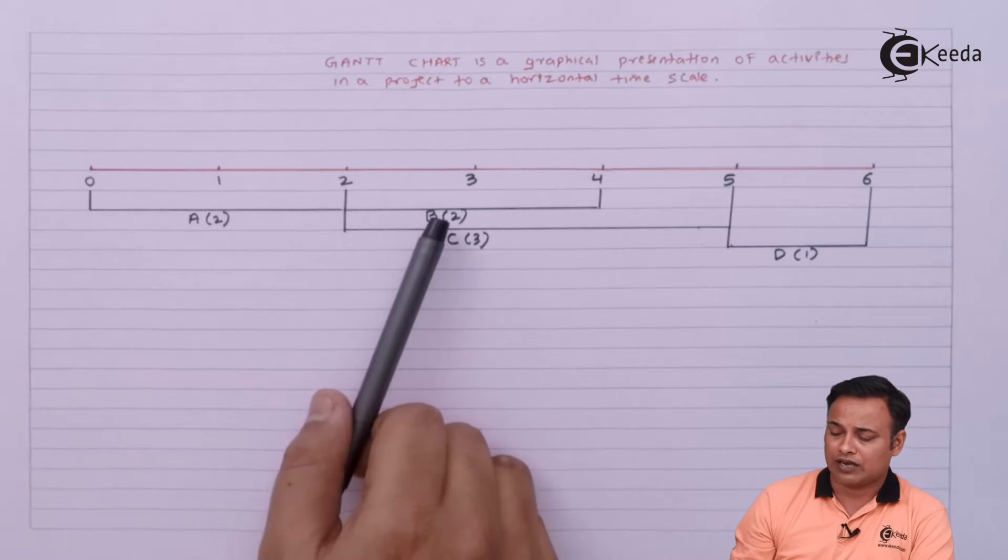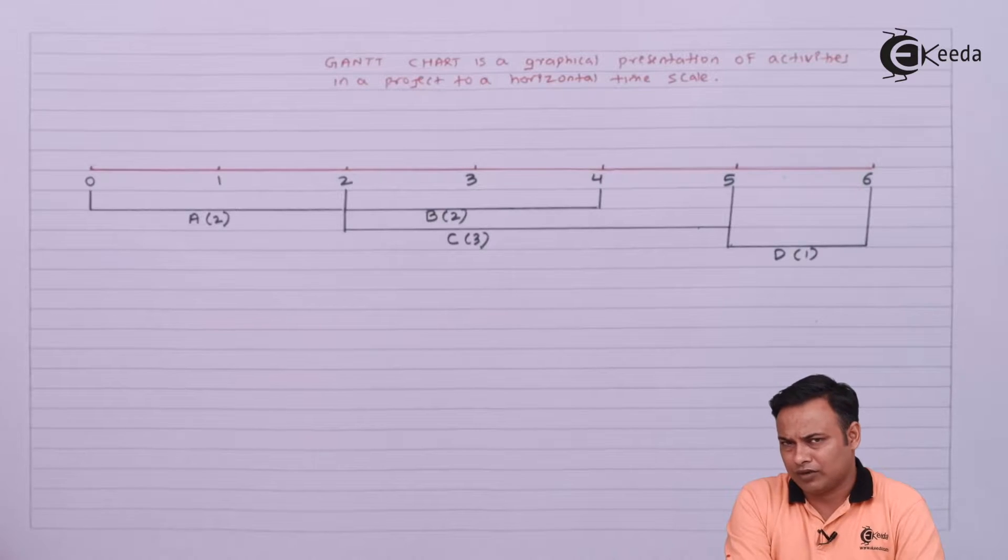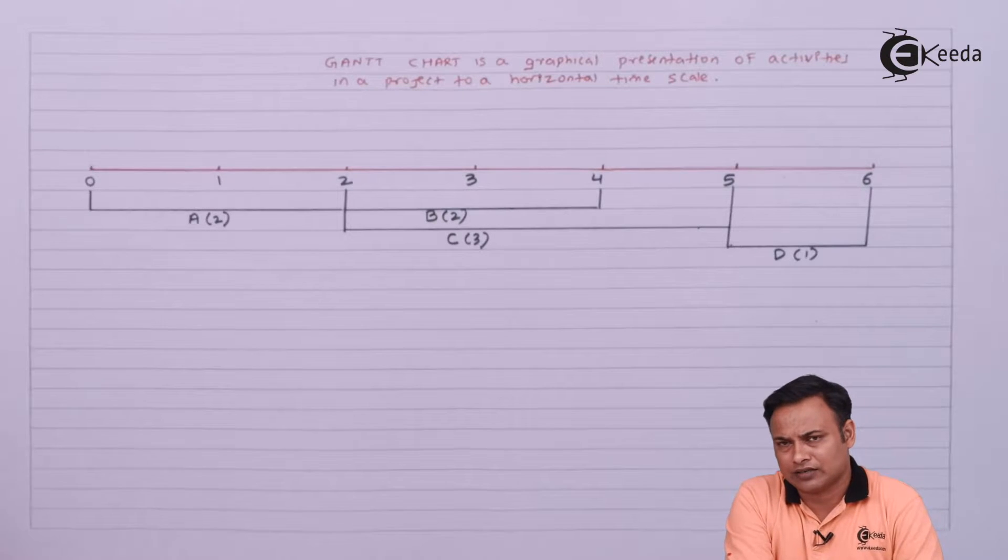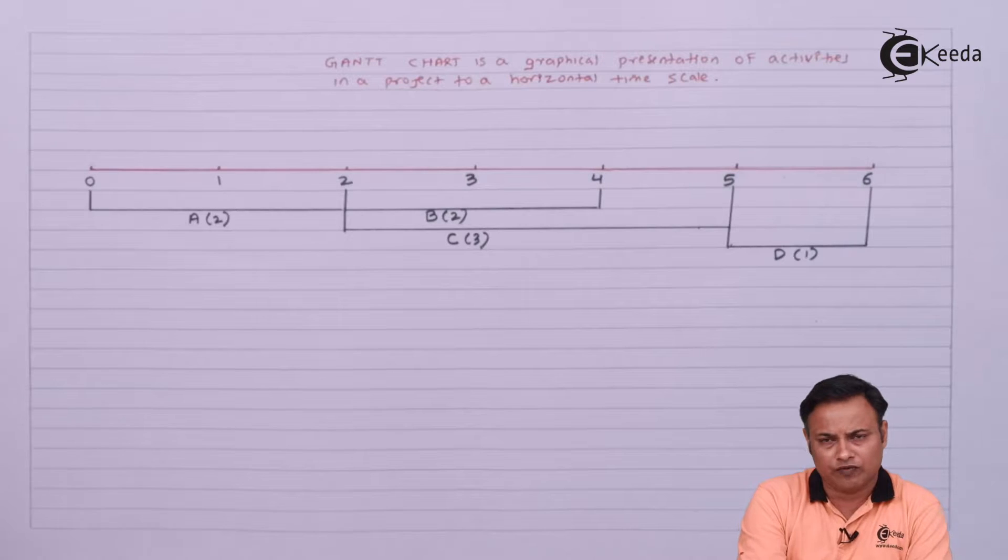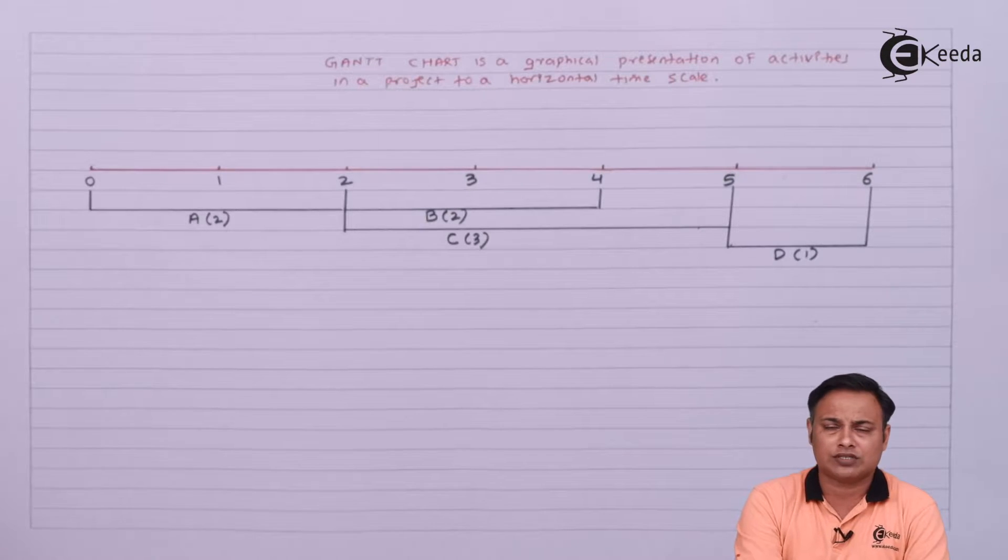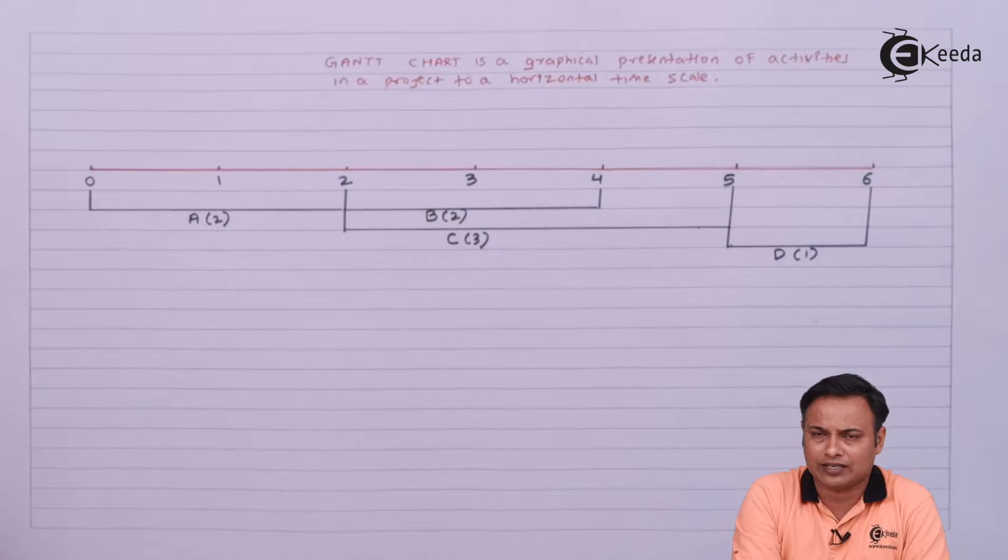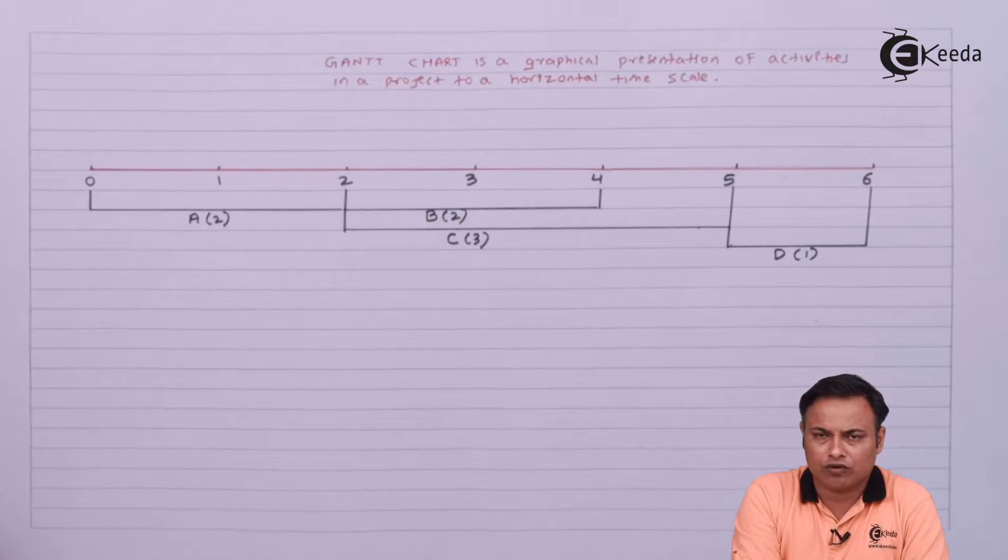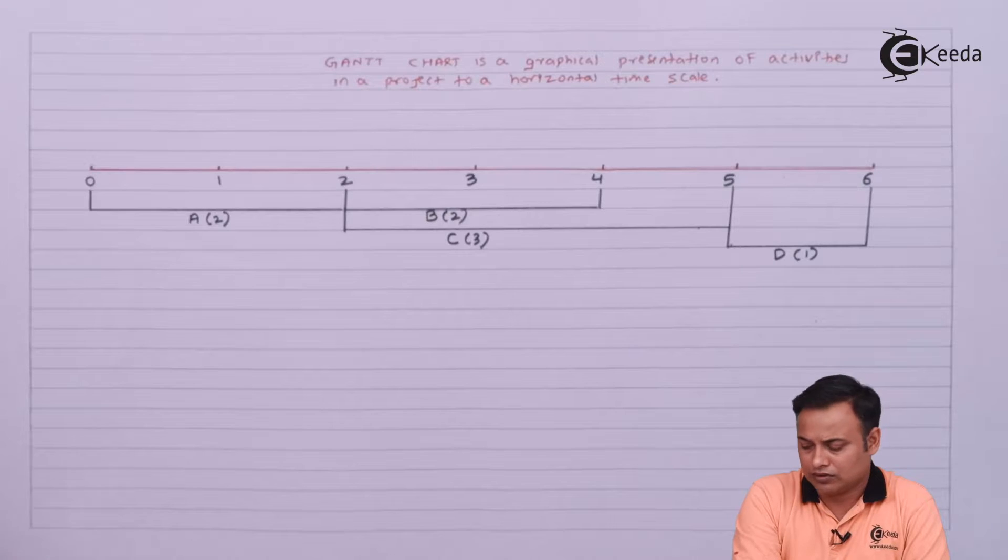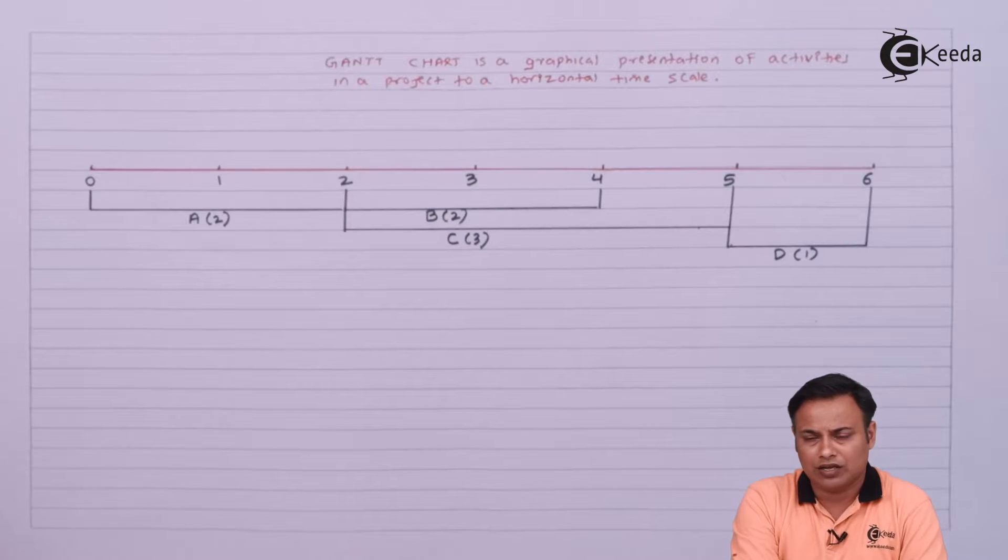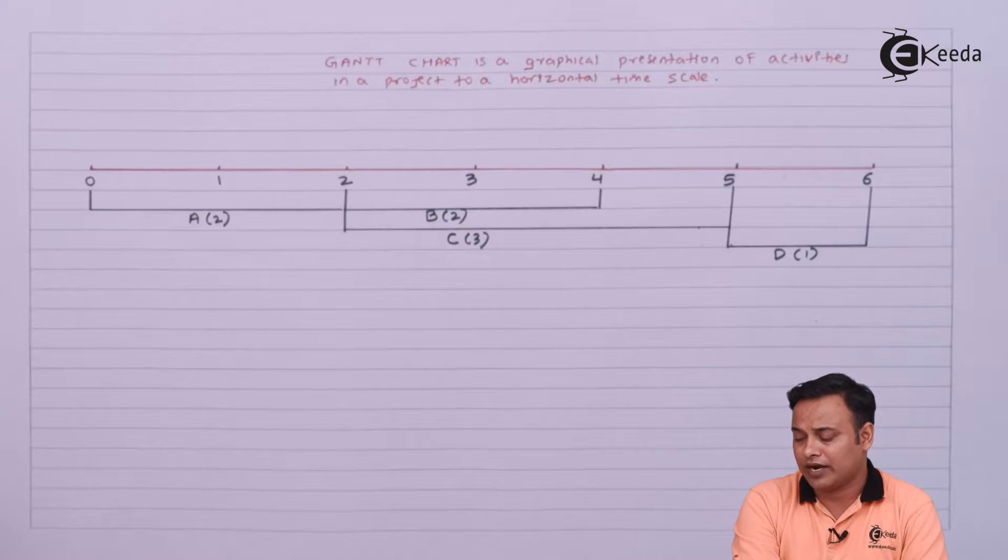But which activity will start after which activity may not be very clear. Second, one cannot ascertain the progress of the activities by looking at the Gantt chart. Gantt chart is very useful before starting operations, but once operations are implemented, the firm may not be able to utilize it to a great extent. Let's solve a problem based on this concept.